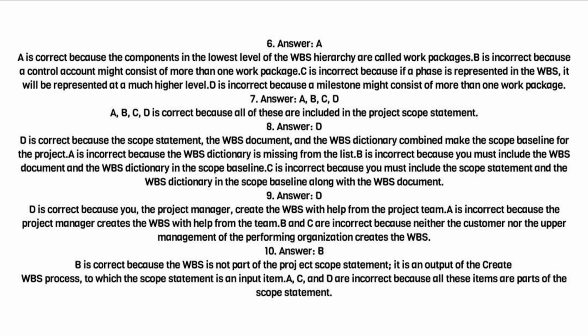8. Answer. D. D is correct because the scope statement, the WBS document, and the WBS dictionary combined make the scope baseline for the project. A is incorrect because the WBS dictionary is missing from the list. B is incorrect because you must include the WBS document and the WBS dictionary in the scope baseline. C is incorrect because you must include the scope statement and the WBS dictionary in the scope baseline along with the WBS document.